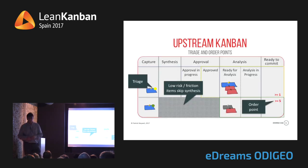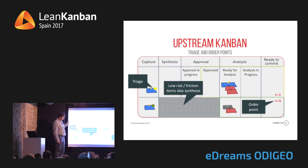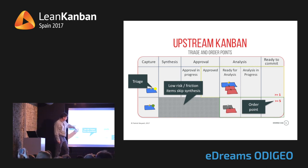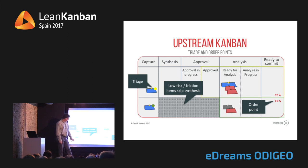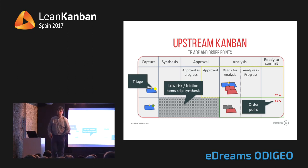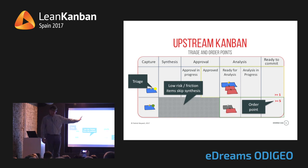We redesigned the upstream board with this triage. Reds are expedited immediately downstream. Blacks are escalated off the board. Yellow items go through a two-step process. Green items immediately go into analysis, but we have an order point of five items — once we have five items ready to be committed, we don't pull in any more green items. So now we start evening the flow, creating a balance for downstream to have an even flow of incoming work.